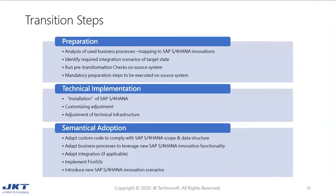The main transition steps are preparation, technical implementation, and semantical adoption. In preparation, we do analysis of all used business processes and S4HANA innovations, identify required integration scenarios of the target state, and run pre-transformation checks on the source system. In technical implementation, we do the actual installation of S4HANA software and customizing adjustment of the technical infrastructure. Finally, in semantical adoption, we adapt custom code to comply with S4HANA scope and data structures, adapt business processes to leverage new S4HANA innovation functionality, implement Fiori, and introduce new S4HANA innovation scenarios.